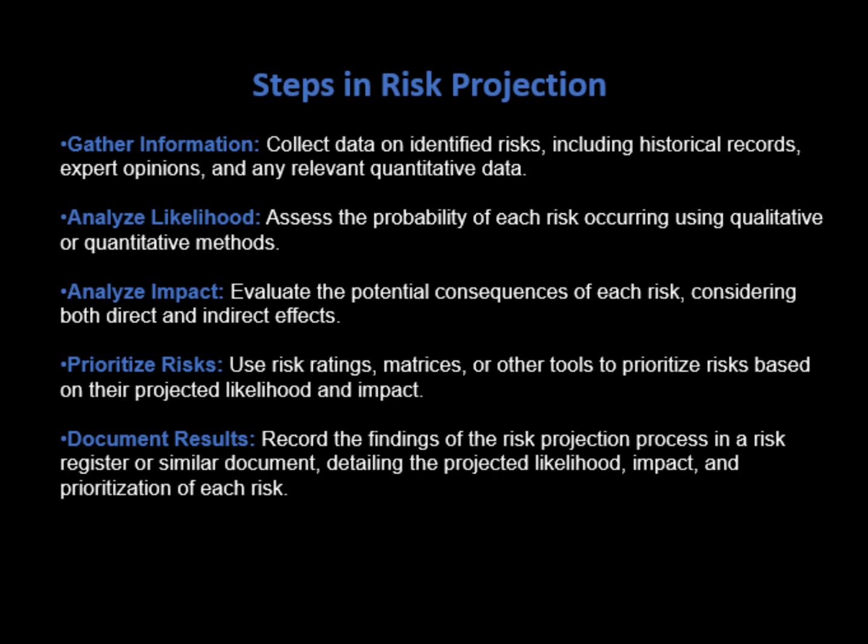Document results. Record the findings of the risk projection process in a risk register or similar document, detailing the projected likelihood, impact, and prioritization of each risk.